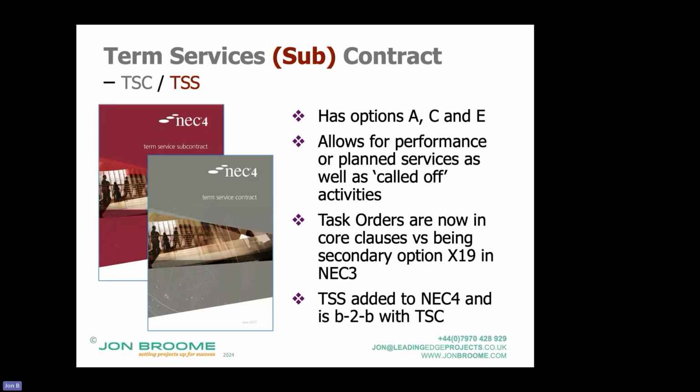Planned services, again on that one, it was once a year you have to clean out the drains, and we'll audit that. We won't check every drain, but when you say you've done this section, we'll go and audit it. And then you get paid for it. If it keeps on getting flooded, or if it gets flooded in that year, we might instruct you as a rate, as a called-off service, to redo the drains.